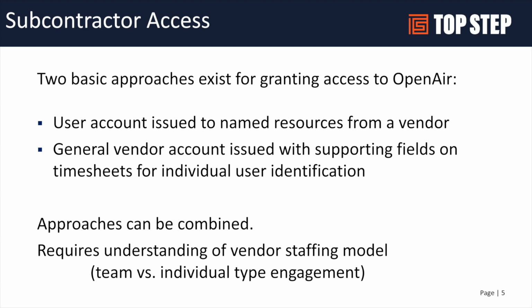They can come in and enter the time spent by the different contractors against the different projects. You can use the notes and description field on the time entry to determine the contractor that did the work. And in that scenario, you're only burning a single license versus burning the 10 that otherwise would be needed.